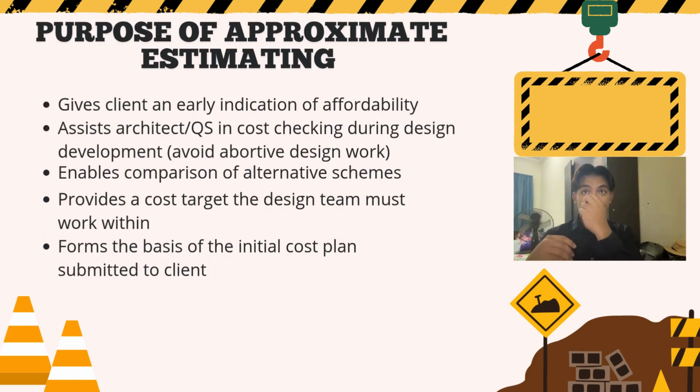So next is the purpose of approximate estimating. Specifically, what's the purpose of doing this at the early stage? First, it gives the client an early indication of whether the project is even affordable. Second, it helps the architect and quantity surveyors, or QS, check the cost as the design develops, so they don't waste time designing something that the client can't afford. This is called avoiding abortive design work.